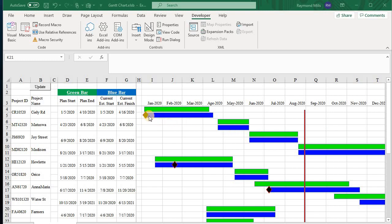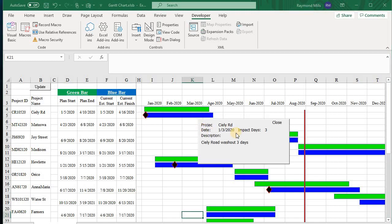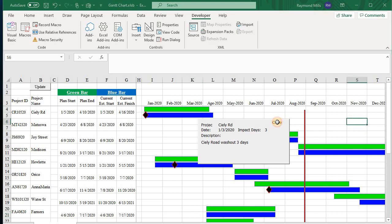Now the dark black diamonds indicate an event. So here we had a little slippage, right? We had slippage because Sicily Road had a washout for three days. Now, how do we know that? Let's just go over here and do this again.